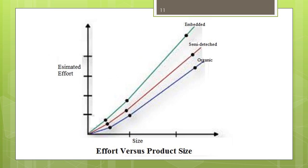Some insight into the basic COCOMO model can be obtained by plotting the estimated characteristics for different software sizes. This graph shows a plot of estimated effort versus product size. From this graph we can observe that the effort is somewhat super-linear in the size of the software product, meaning the effort required to develop a product increases very rapidly with project size.